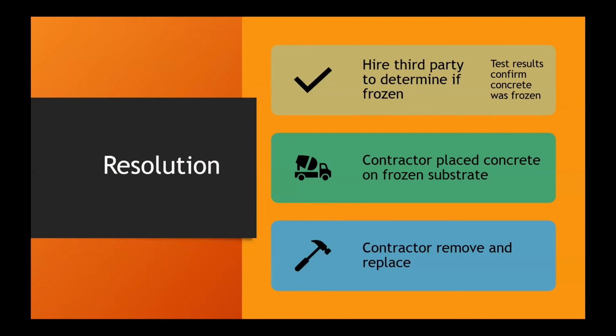So this was the project team's resolution. A third party was hired to determine if the concrete had frozen. So now this was brought up in a chat to check the concrete in the frozen area or the honeycombing area. Test results confirmed that the in-place concrete was frozen. Contractor did place concrete on a frozen substrate. So the department tells Mr. Contractor, you need to remove and replace the pier cap at no cost to the department.